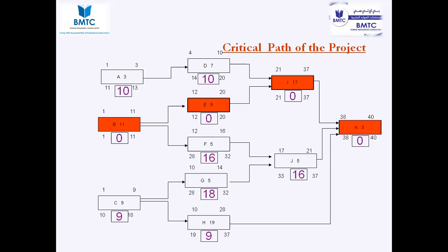Ask the resource managers to estimate and assign the resources. Take all your calendars and estimate how long it will take to complete each task. Once you have the complete estimation for all the tasks, develop the schedule: aggregate and sum up all the tasks. You know very well when you have to start and when you have to complete your work, using the CPM method.